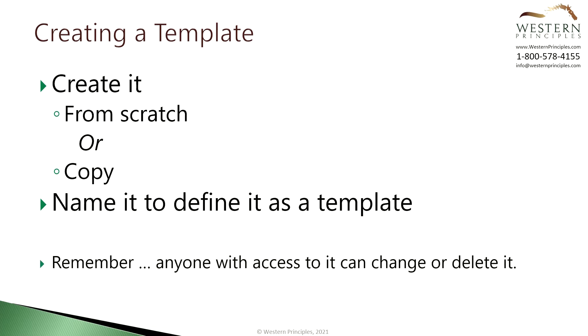A word of caution. Anyone who can access the template will have access to change it or delete it. That's a limitation of Microsoft Project for the Web today and you need to be aware of it.